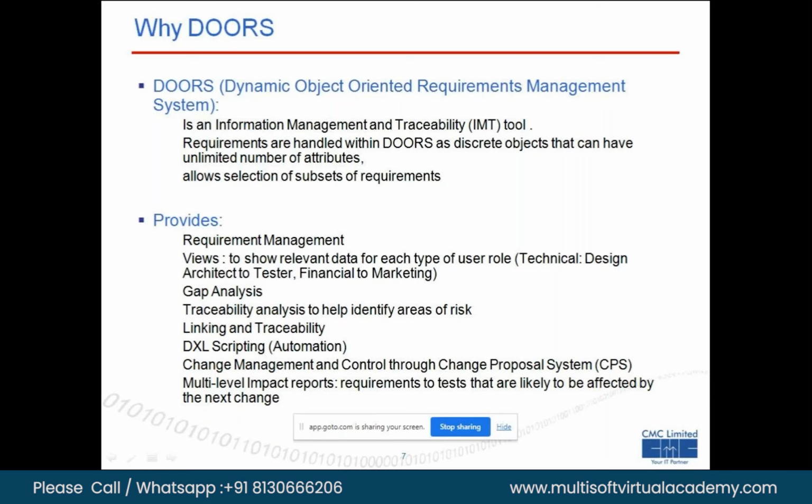If you ask me the order, it depends on your organization generally. But based on my experience, unit testing, requirement based testing and software integration testing, everyone starts in parallel, when the software is released and smoke test results are confirmed positive. Vehicle level testing starts a bit later, because it depends on software maturity. Then there will be design verification and design validation, which is the last point, for the hardware design or similar. So design validation will be done last, as the last activity.